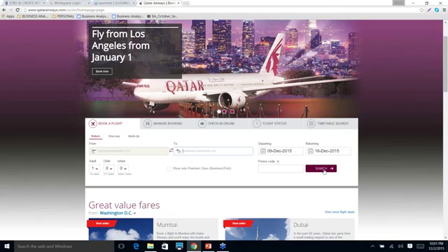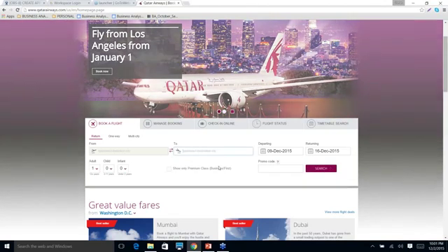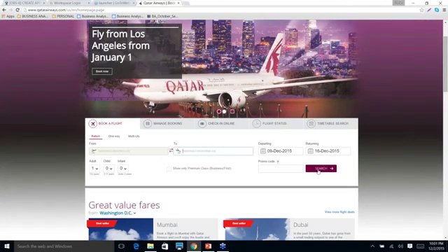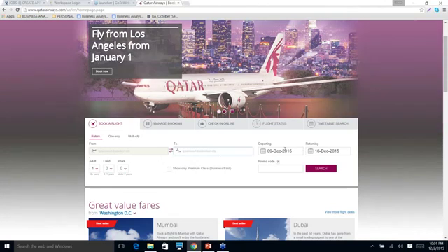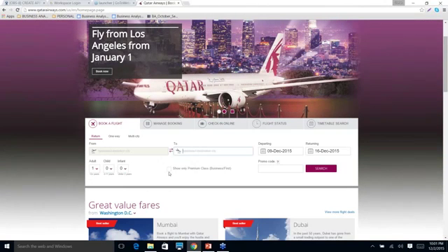Searching can be another story, where I'm saying that the scope of that story will only be limited to entering the data here and clicking search. I'm not concerned about seeing the results right now. I'm just saying, let me enter these from and to values, the dates, departing and returning, the child and all those things, so that I can search for my flights. That can be a second story.